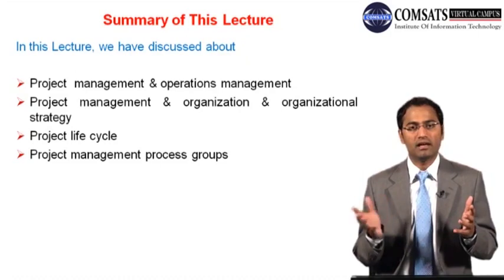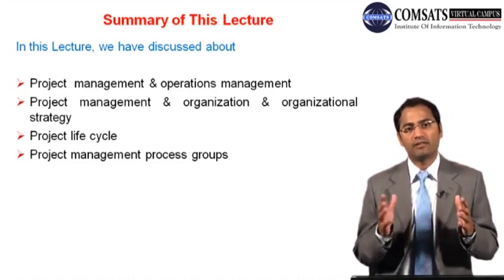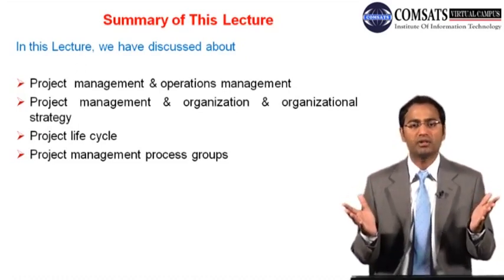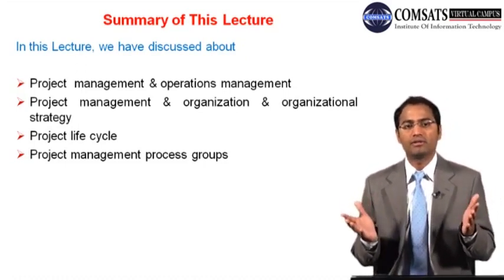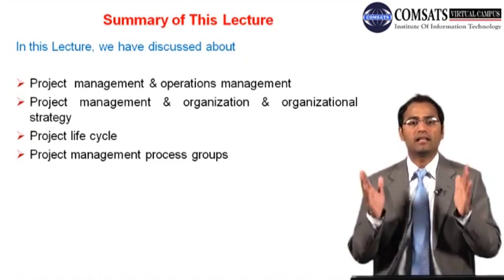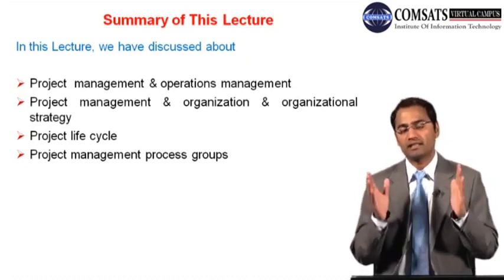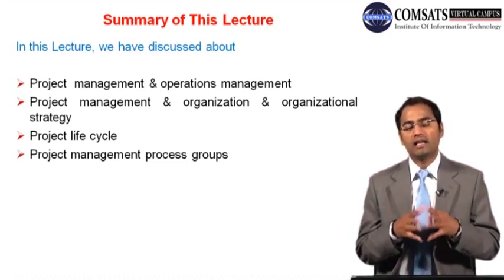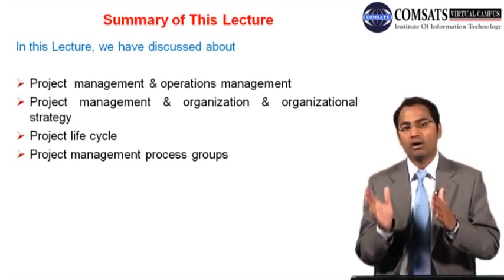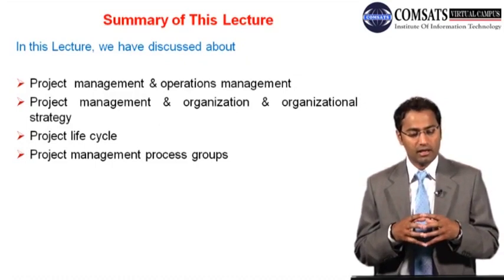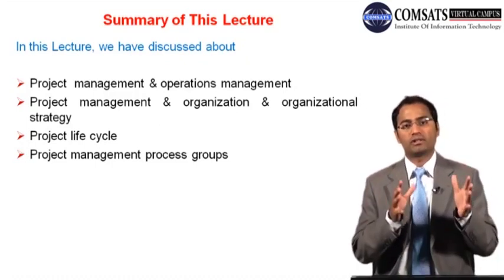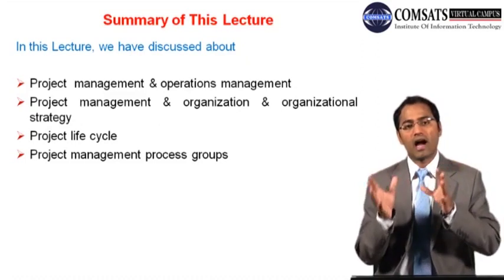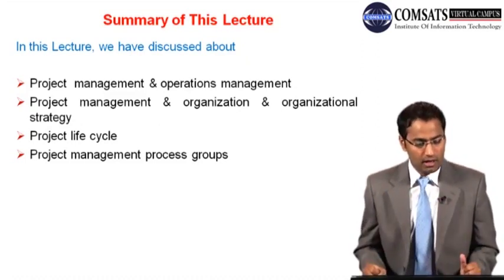So the project life cycle, if we are taking PMI as the standard, then as far as project management is concerned, there are five phases: initiation, through which we develop the project charter; planning, through which we develop the project management plan; and then execution, through which we get the validated and accepted deliverables; and monitoring and control, through which we keep the project on track and our stakeholders on board and informed of how our project is behaving; and then closure, where we close the project, and we archive all the data for future projects and learning.